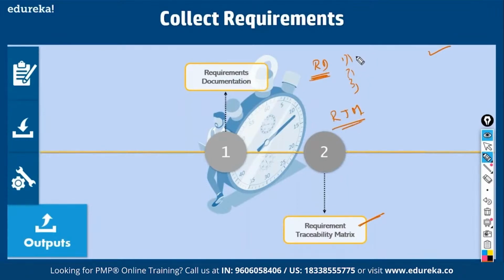So you have to map the requirements to the high level business need, that is, you want to be the market leader. Then you may have to map this to architecture drawings, then database procedures. Then for this particular prototype, you would have done a lot of tests: test cases, test scenarios, test conditions, test results. You have to map it through all these, and only then you can sign off. That is called a requirement traceability matrix. So when you collect requirements, you also stipulate the template in which you'll be demonstrating compliance with requirements to the stakeholders later on, so that you'll get a formal acceptance.